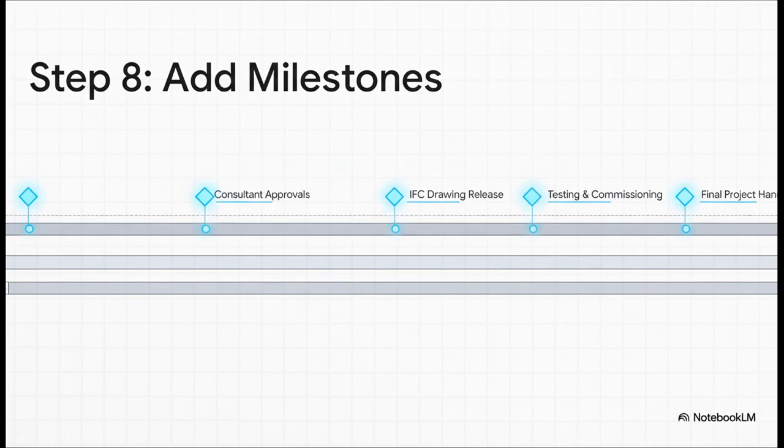So once you have the basic structure, the next key thing to add, this is step 8, is milestones. Think of milestones as the big, important signposts in your project. They're not tasks that take time. They're zero-duration markers for really significant events, like getting a key approval or the final project handover. They're how you track your big-picture progress.